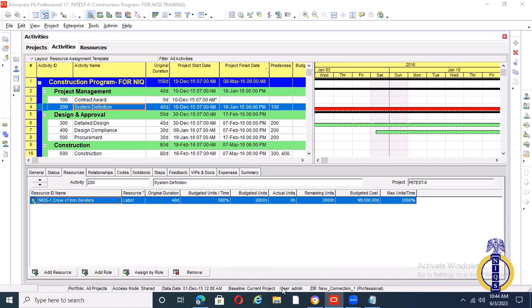So as a QS, please note that when you are preparing interim payment certificates, or sending to your clients, you need to look at your contract documents and read the terms of contract. Even when you're submitting those invoices, you print a copy of that contract, circle it, and attach it to that invoice before you go and submit with your cover letter. Those are the things you submit. I think I've deviated, sorry, but I'm trying to explain this. So we'll call it split currency.